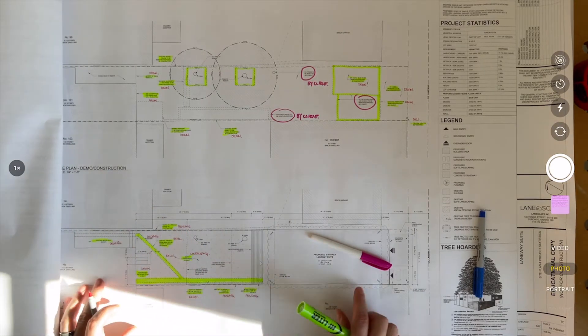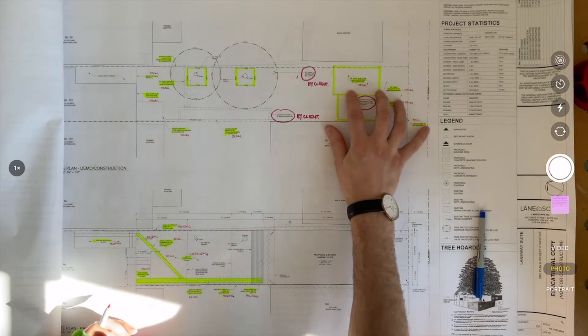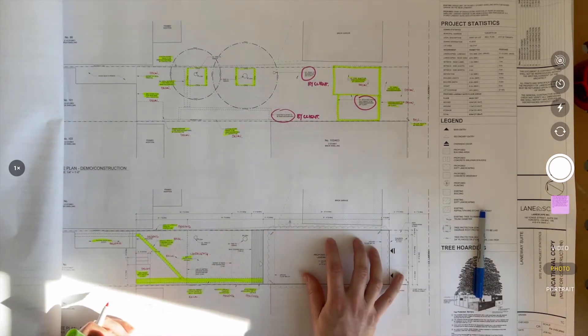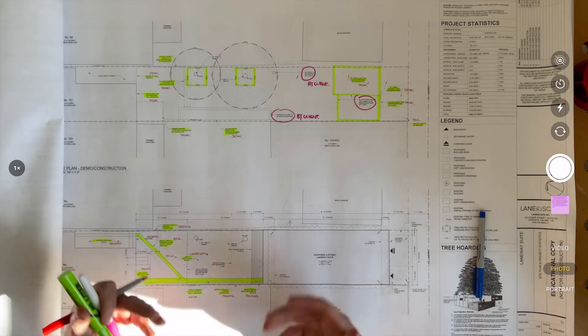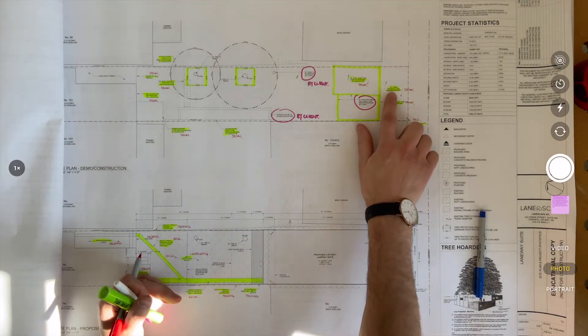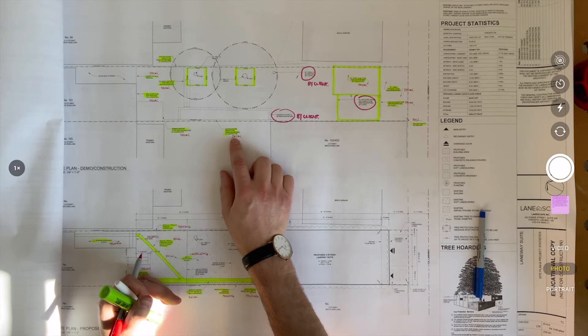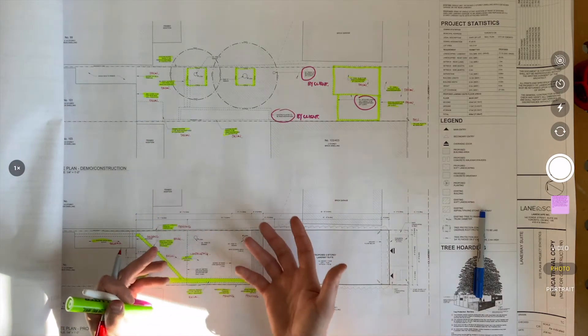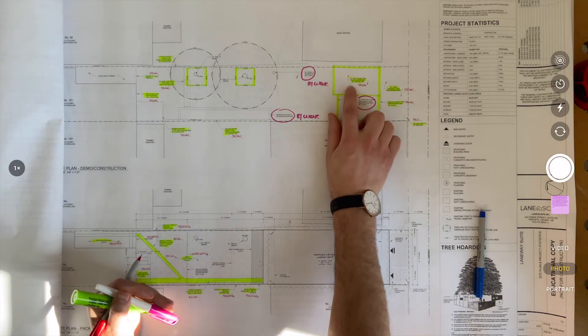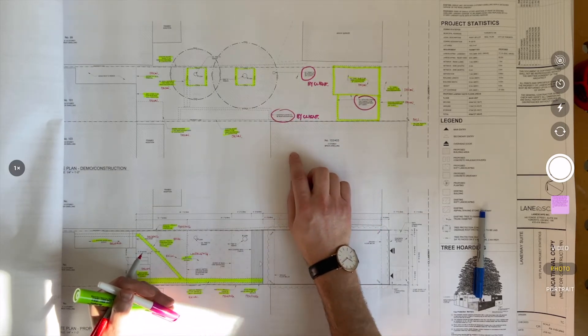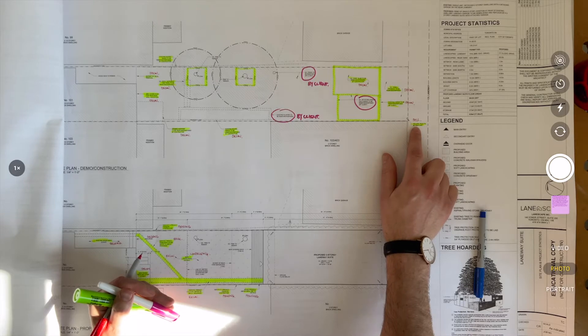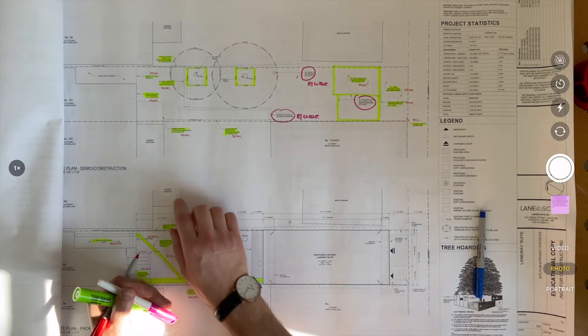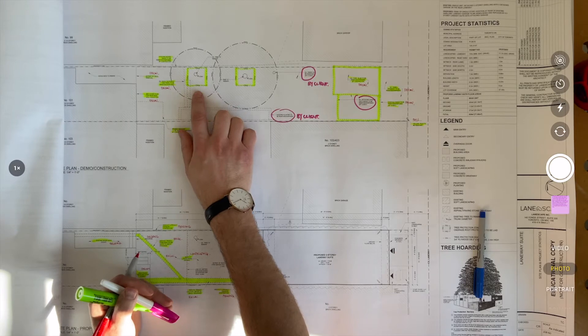Perfect. So there we go. What I've done is I've covered the existing site plan and the proposed site plan. Everything that we have to do as a contractor has been highlighted in green. And in red I've just indicated which construction category these activities fall into. So the removal of the existing garage is in deconstruction. The removal of the existing bell telecom pole will be in utilities. Construction of the TPZ will be in site plan, etc.